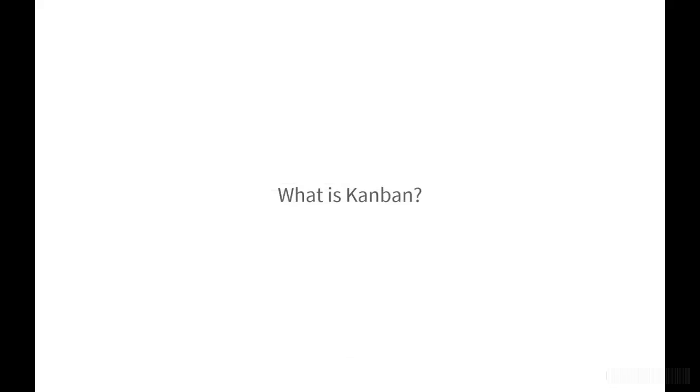Now let's talk about another key aspect of Azure Boards, the Kanban board. Kanban, originally developed by Toyota as a scheduling system for lean and just-in-time manufacturing, helps a team focus on quality by ensuring that work meets an agreed-upon level of quality before it can be considered done. In software development, Kanban consists of stakeholders adding requests to a backlog and the team then pulling work into their workflow as capacity allows. The Kanban board is used to visualize this process.